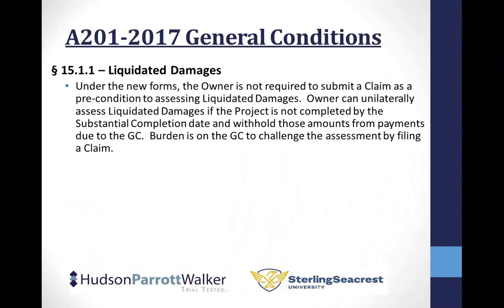Now, I have this exact scenario headed to arbitration in April, in which this took place without this language. What's the problem? The problem is that in that case, the general contractor did a comprehensive critical path schedule analysis to determine that there were over 150 delay days caused by the owner's failure to deliver required materials that were a precondition for the work going forward. The owner's response was not to conduct a schedule analysis. As a matter of fact, they just tendered an expert with no schedule analysis and say, yeah, we're asserting liquidated damages. And we're unilaterally allowed to do that. This provision arguably would allow an owner to get away with it, to unilaterally assert liquidated damages without performing a critical path schedule analysis as to what was the precipitating cause of delay.